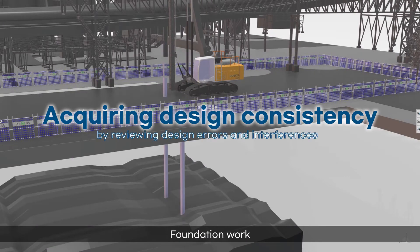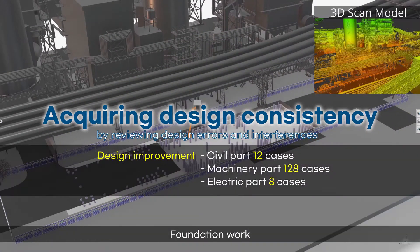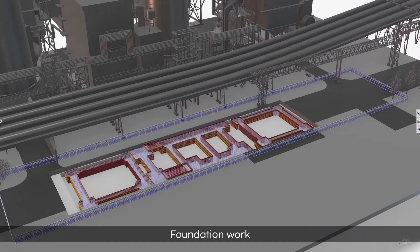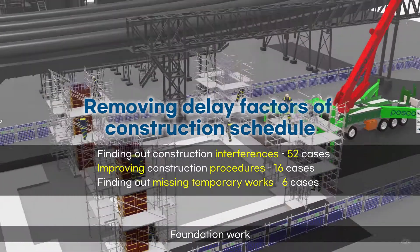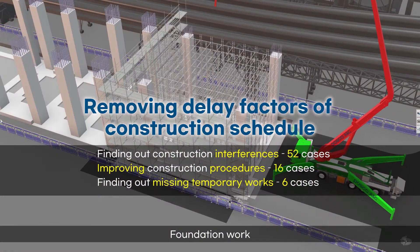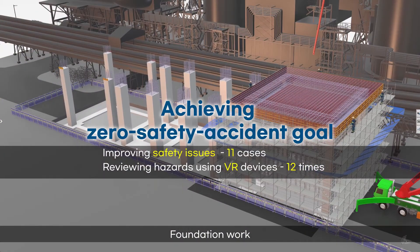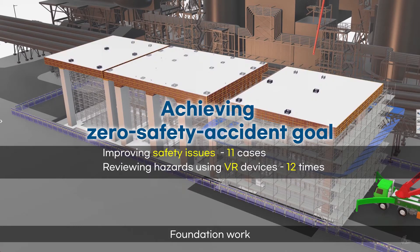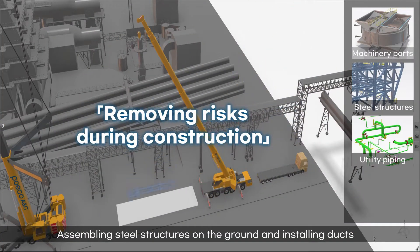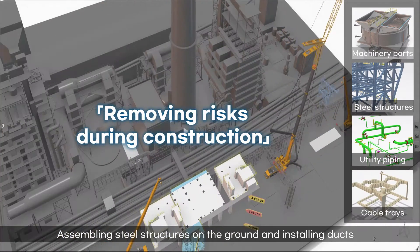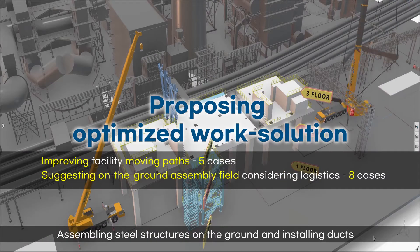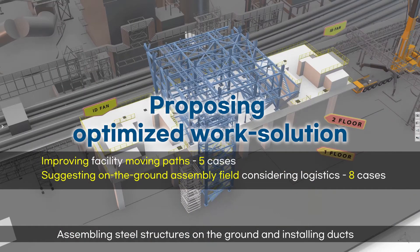We checked design errors and interferences through 3D scanning of new and existing facilities. Through this, we removed delay factors such as missing temporary works and construction errors, and prevented any safety accidents on the construction site. We thoroughly reviewed design consistency and processes to find out risks, so that we could carry out SCR installation work without any delays on civil foundations.